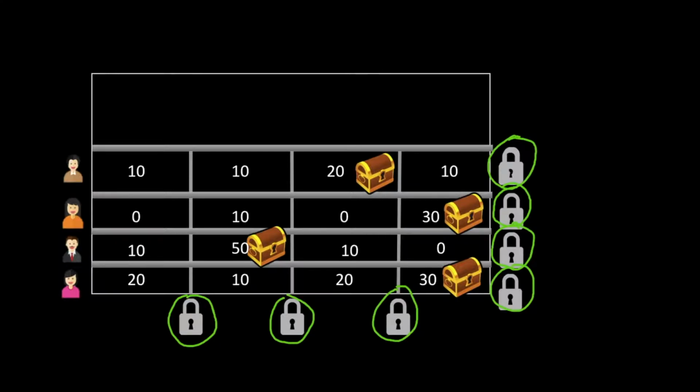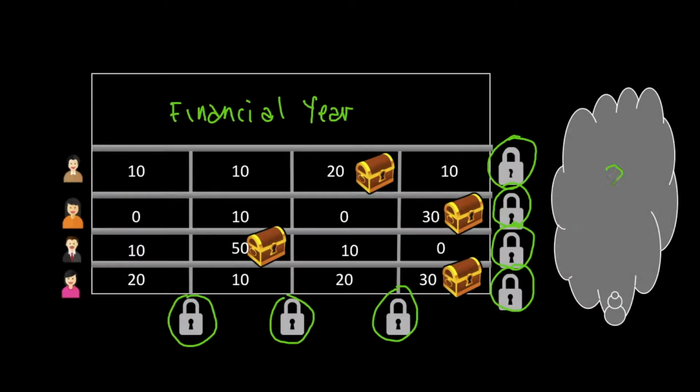Another feature, in order to manage the inherent uncertainty associated with this process, people often create contingencies which are hidden, and they're always spent. Because if you don't spend your contingencies and spend all of your budget, you're very often going to be left with less money next year. Finally, all this takes place within the context of a single financial year. We have no visibility of future years, which presents a real problem for people who are managing projects that span years, or for people who need to start working on a project in the following year, because they don't know what resources are available until the budget is finally locked down, which might be very late in the year.